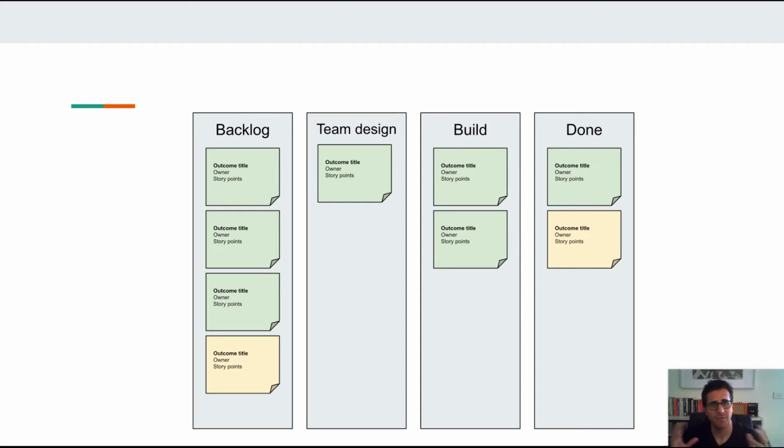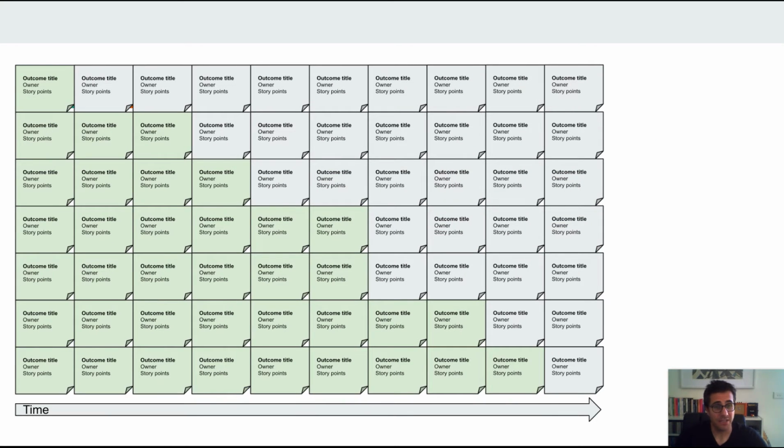But what we're saying here is we've got a Kanban board that's a couple of days into the sprint. We've committed to 1, 2, 3, 4, 5, 6, 7 user stories in the sprint. So if we wanted to monitor how we're getting on, we could look at this Kanban board every day and we'd be comfortable with that. But if you just wanted a quick snapshot of how we're going, from trends, from sprint to sprint, you would look at your burn downs, because it would keep a history of it. This is effectively the burn down.